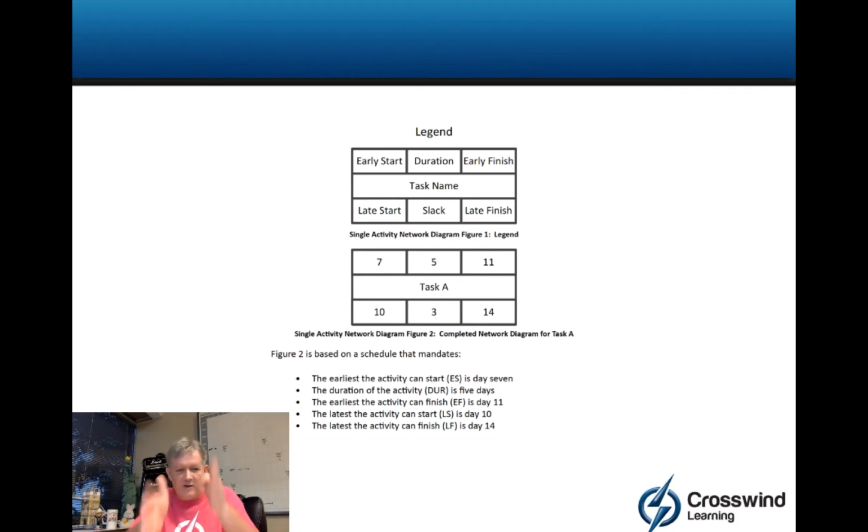And remember, when I do math up and down, or number analysis up and down, I subtract. Now, that gives me my difference of 3, which goes in the bottom middle number. So I could get it from either left or right corners. Now, the way I get my duration is by counting on my fingers. So if I'm going left to right, I count on my fingers.